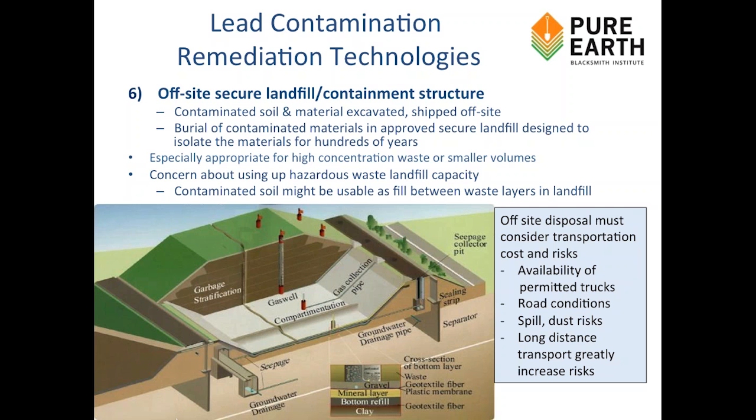Any off-site disposal strategy has to consider the availability of trucks to carry things, the road conditions, how narrow the streets in the source area are, whether you are going through a residential area, that sort of thing. Consider the risk of spills and dust, and the fact that long distance transport significantly increases the risks of spills and accidents or diversion.